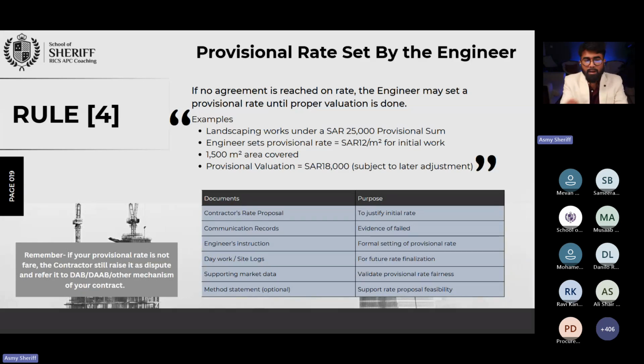For example, while I was working on one of the projects, the contractor came with a suggestion that the overall cost for his work was going to be 26.4 million. And he requested an additional amount of 12 million, considering so-and-so thing, and he provided certain rates for this. So the cost consultant and I checked the rates, and we identified that those rates are not acceptable. You wouldn't believe, for one item they claimed around 25,000 riyal, where I can go to the market and bring that for roughly 2,000 riyal.